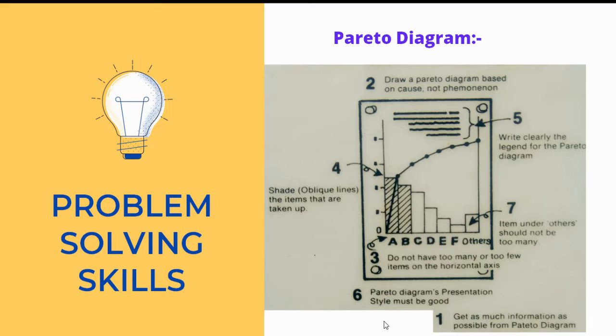This technique helps to identify the top portion of causes that need to be addressed to solve the majority of problems. The application of Pareto analysis in risk management allows to focus on those risks that have the most impact on the project.